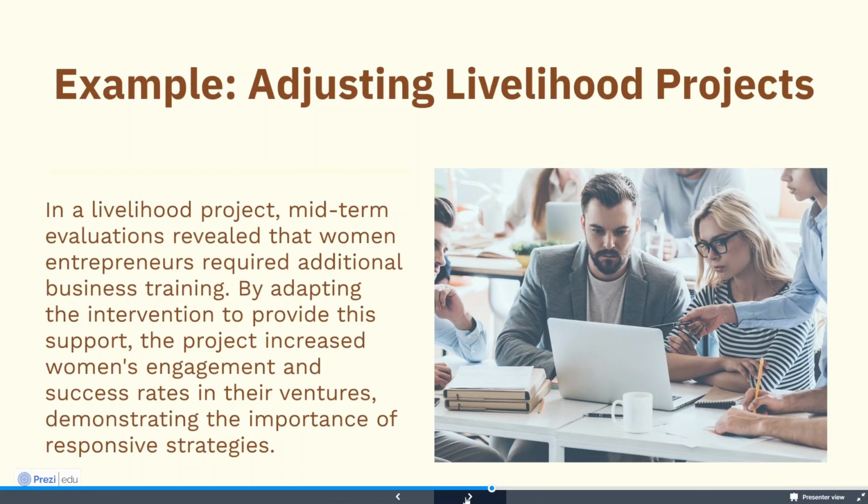For example, adjusting a livelihood project. In a livelihood project, midterm evaluations reveal that women entrepreneurs require additional business training. By adapting interventions to provide this support, the project increased women's engagement and success rates in their ventures, demonstrating the importance of responsive strategies.